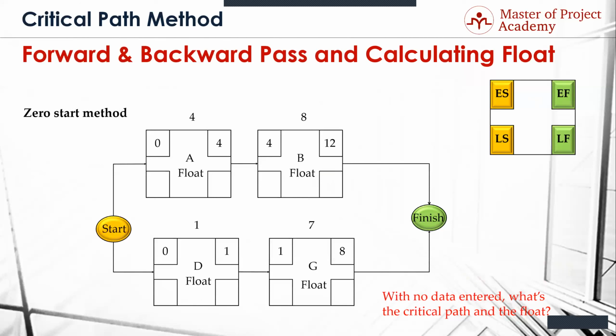If our early finish is 12, which is this one right here, the latest we're going to be able to finish it is 12. It's got to be the same day. So what's going to happen is 12 days is going to go in there. And there's another reason you know that, because you know already from your brain power those numbers are all going to match. You know that's the critical path, and you know that it has 0 float, so you know those are all going to match.